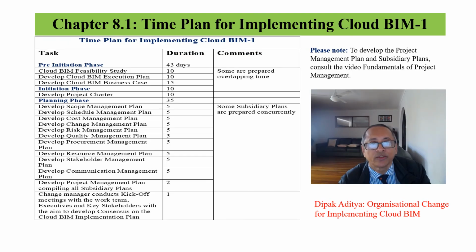See the time plan for implementing Cloud BIM for your organization. Pre-initiation phase needs 43 days. The planning phase to develop a project management plan and subsidiary plan will take an estimated 35 days. To develop a project management plan, consult the video Fundamentals of Project Management.